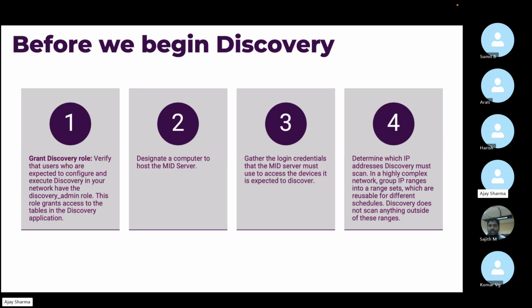And in the scope of work, things are mentioned clearly, like you have to do discovery of 200 devices of certain device types. You have to create the IRE, identification and reconciliation engine, rules or mechanism. You have to build the data model, in a particular format. You have to create the architecture diagram, HLD or LLD. A couple of things have to be performed before your implementation starts. If you design and understand things correctly, your implementation will go in a good manner. So just try to assess that first while you are going to implement.